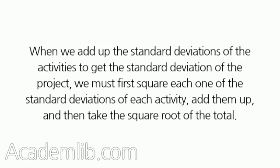When we add up the standard deviations of the activities to get the standard deviation of the project, we must first square each one of the standard deviations of each activity, add them up, and then take the square root of the total.